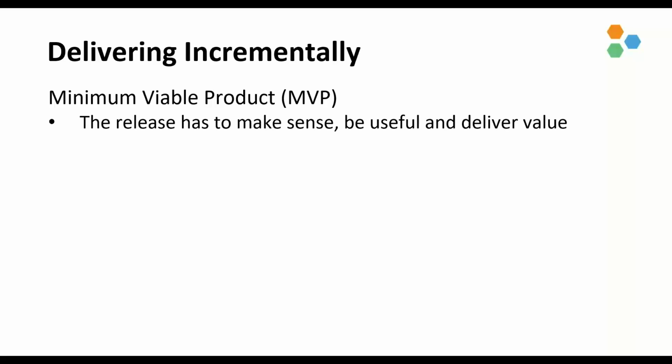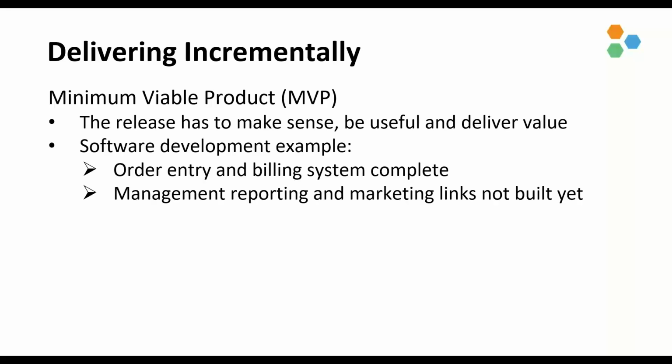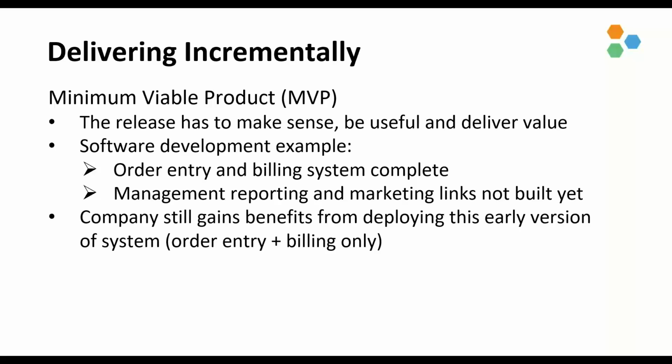So we could call this the kind of plain vanilla version of the MVP. This way we have an opportunity to start realizing the benefits of the product and get an early return on our investment. So a software development example could be what you see here on the slide, an order entry and billing system complete while the management reporting and marketing links are not yet built.